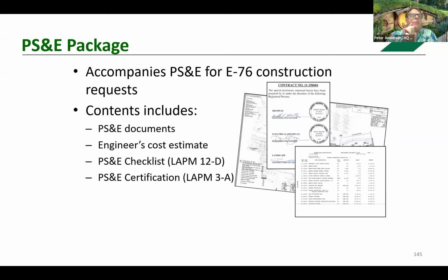So I see a question that came up. What is the process if there are no bids during a competitive bidding process? I actually have a good example of that. It's one project that was up in Susie's area, in District 1. Susie's up in Eureka. I think this was a Humboldt County bridge preventative maintenance project that the county put out, and I believe they may have gotten one bid, but it was extremely high. They said, well, we re-advertise was the first step. Re-advertised it, same thing happened.